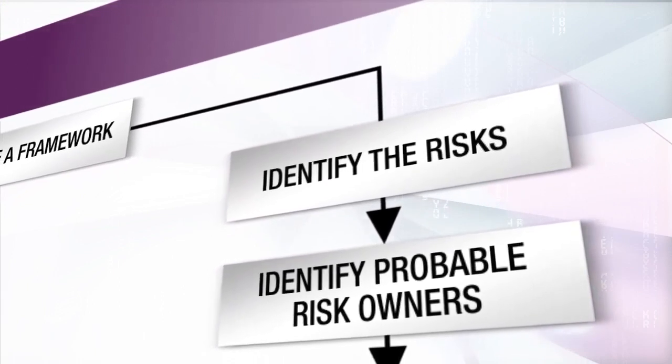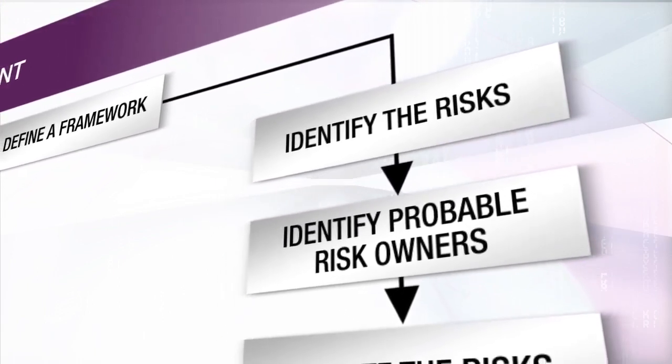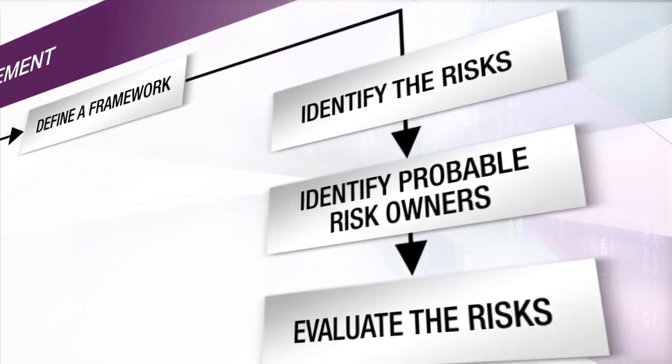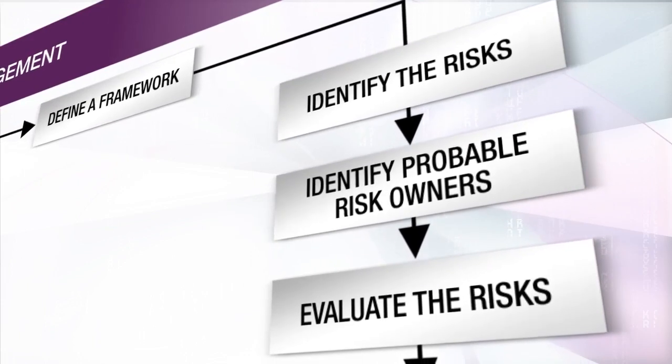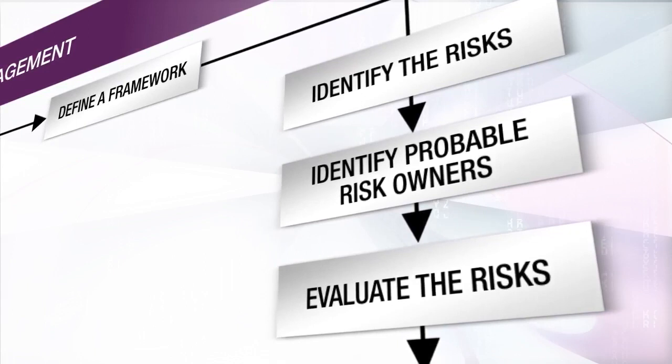The analysis will include evaluating the impact of the risk to the service in line with any tolerances set, identifying suitable responses or countermeasures to the risk, as well as selecting the best people to own the risk and the responsibility for activating any responses.